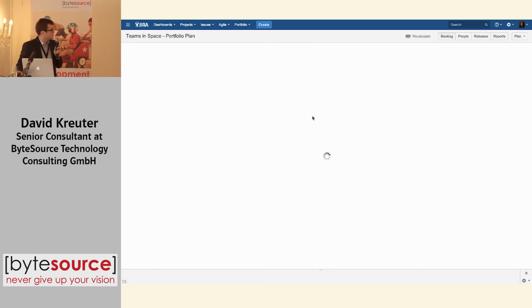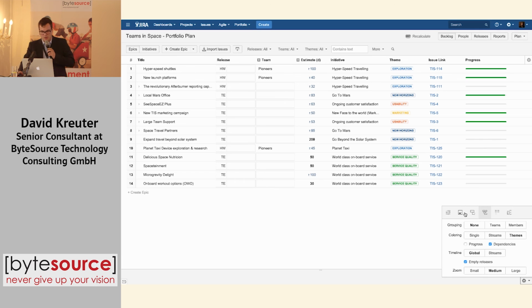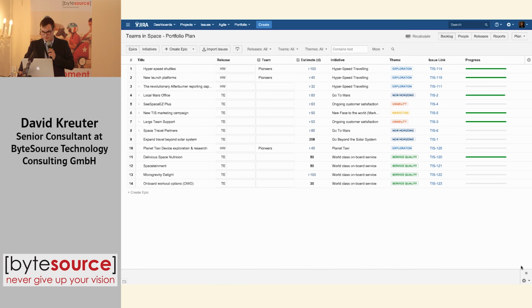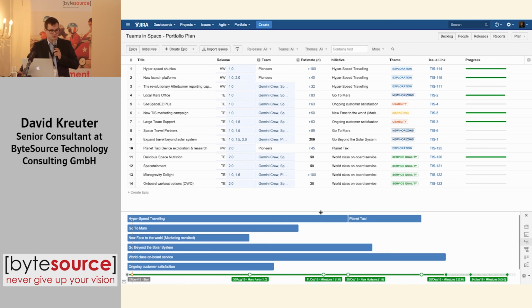What you can see here are the epics. Let's also consider these as work packages. Most of you know it better as work packages. And under these work packages you have user stories. And the crucial part here, you can play around, for example, with estimations. You can really answer these what-if questions. What if I hire an additional guy in my team? What is the impact on my release dates?